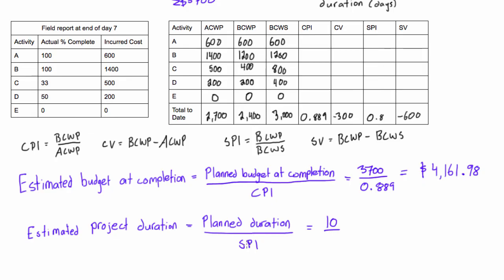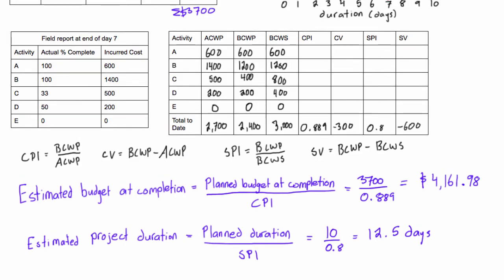So anyways, planned duration - all we do here is just have 10 divided by our SPI, and our SPI was 0.8. So if you just get 10 divided by 0.8, that is actually 12.5 days. That is our estimated project duration.